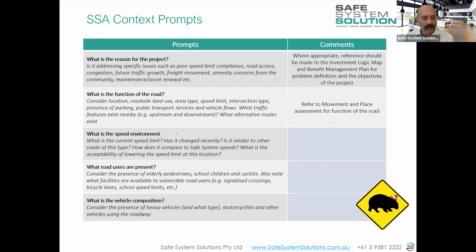And so what I do in a safe system assessment is sometimes often I'll start with a catch up, a meeting with the project team, maybe the designers, the project manager, and just go through each of these questions, have that conversation, build a picture of this project, not just simply from looking at the design, but trying to holistically understand what is going on. Sometimes, you mightn't be in that position and you might just have to have a go at filling these out yourself, or you maybe send these in to somebody who is going to fill them out. But you're trying to just build that picture.